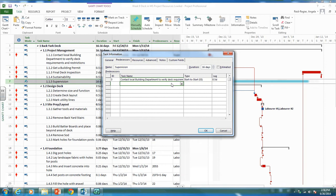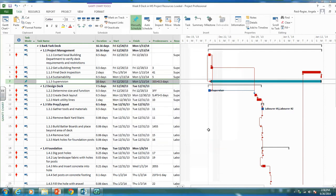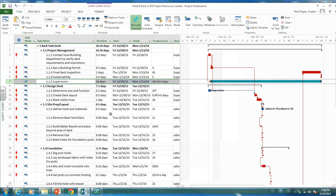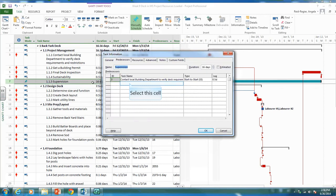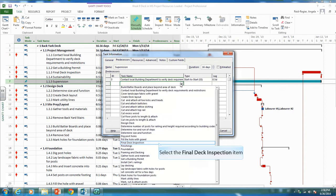Now the supervisory activity will finish once the entire project is done. Our last activity is actually the final deck inspection. So let's put that so it will finish once we have a final deck inspection.